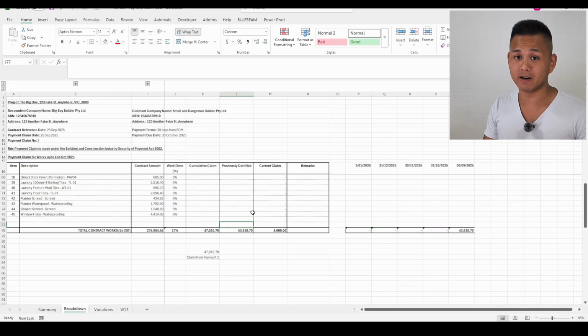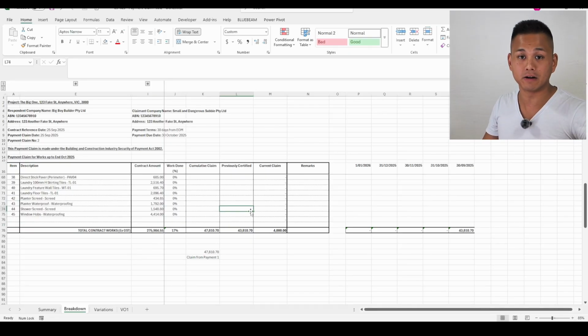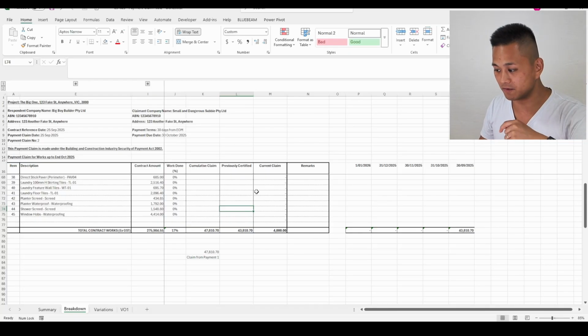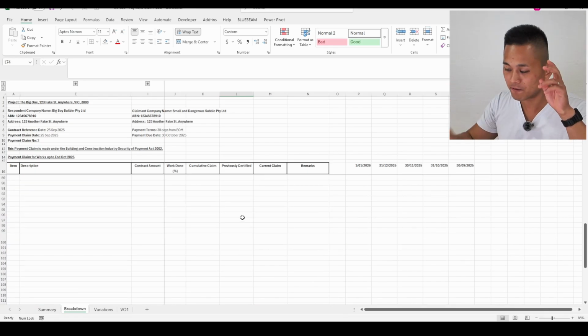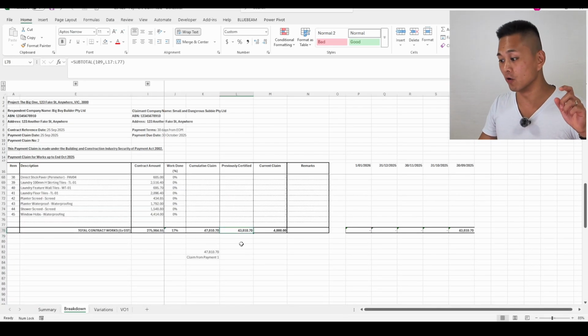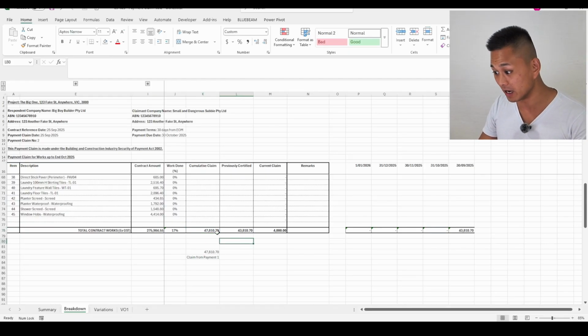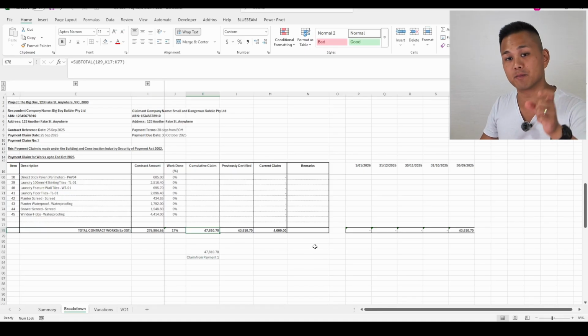But under the Security of Payment Act, he actually doesn't need to revise his payment schedule. He's already met his obligation by giving you the payment schedule, and he can totally ignore you unless you go to step 2, which is the more uncommon step, which is you take him to adjudication to dispute what he has certified in his payment schedule versus what you have claimed. Yeah, but that's basically the only formal way to get him to pay you what you believe you're owed. If you're going to take the builder to adjudication, you better be damn sure that this amount here can be proven and can be justified in the previous month of September.